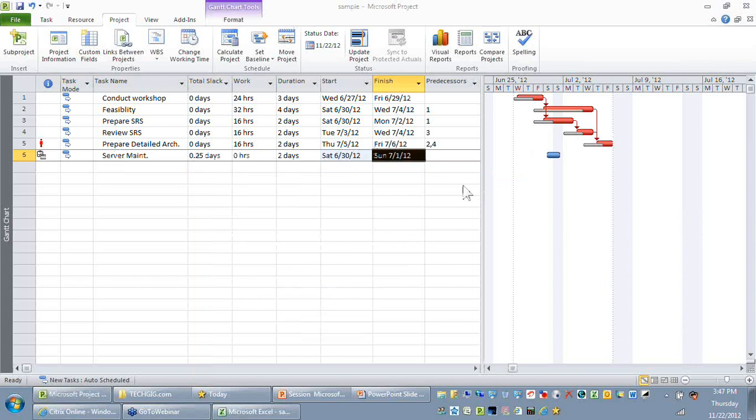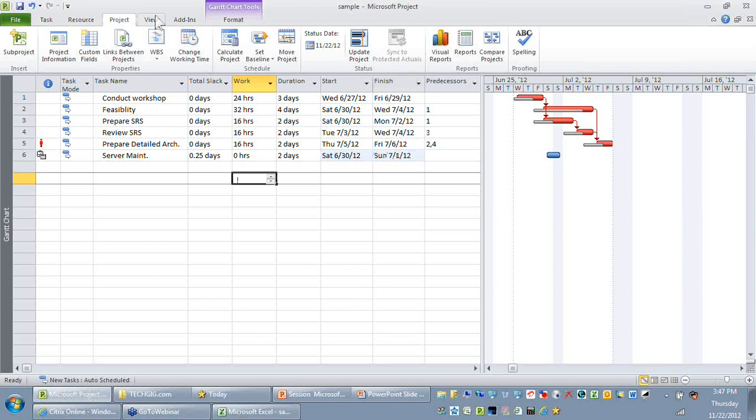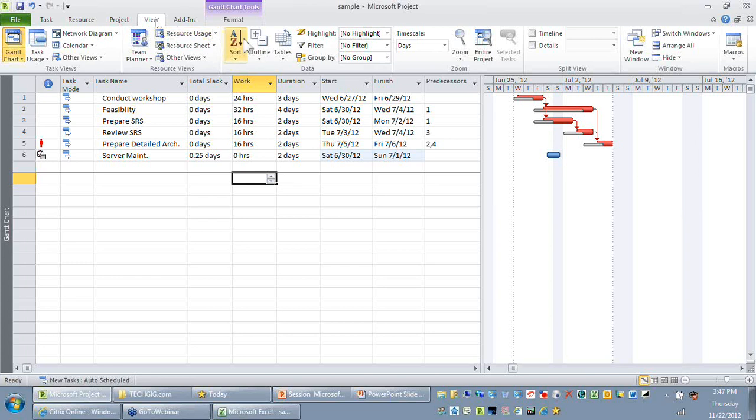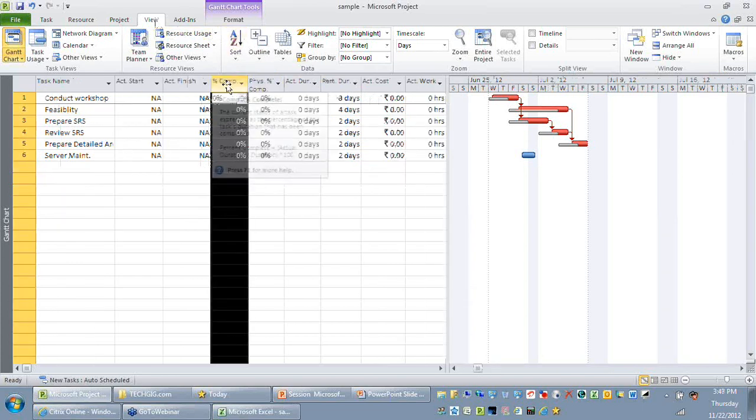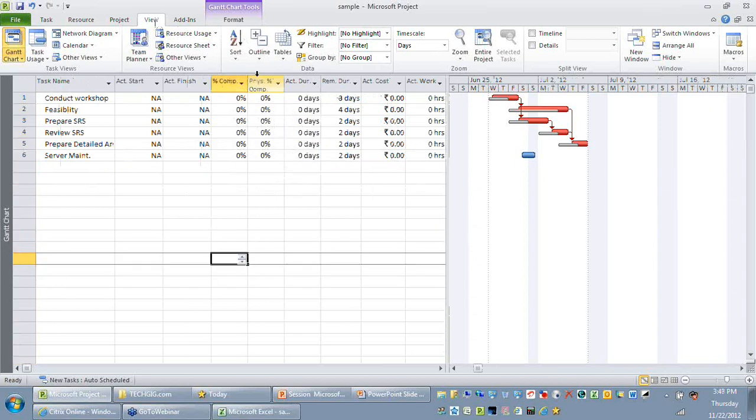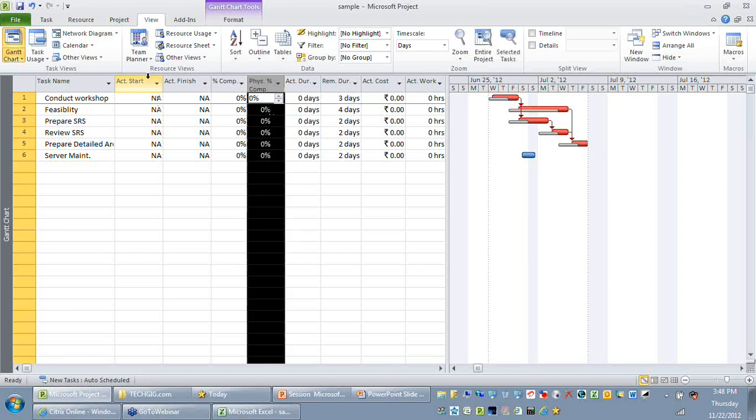Okay, how can I update using quantities rather than percentage? Okay, Abhi Kalyan again. Can you please tell me what do you mean by quantity? I hope you are trying to measure by output rather than by the percentage complete. In the tracking table, as you can see, you have provision only to record your percentage complete, which is your duration completion. But you have another column here called physical percentage complete. I just want to tell you that when you update physical percentage complete, it will not update the remaining columns here. The physical percentage complete is used only as a measurement for earned value calculation.